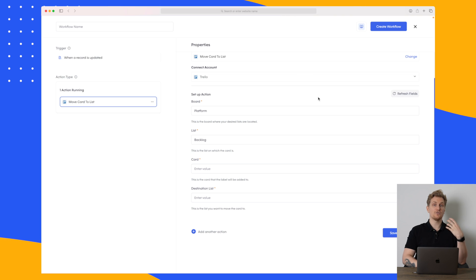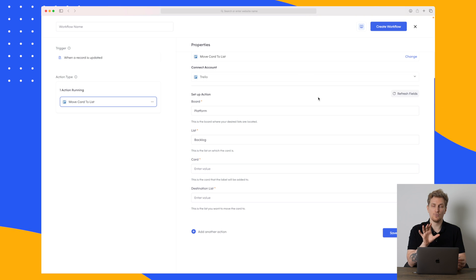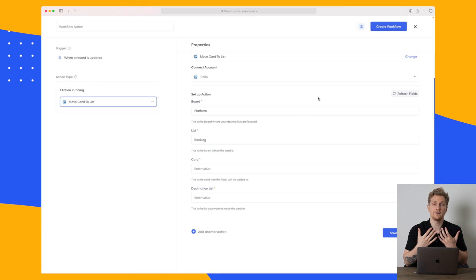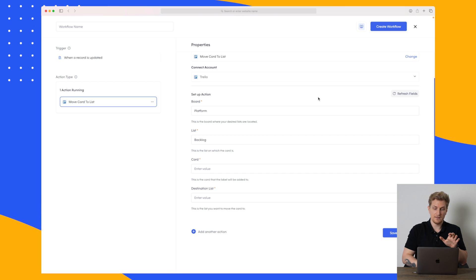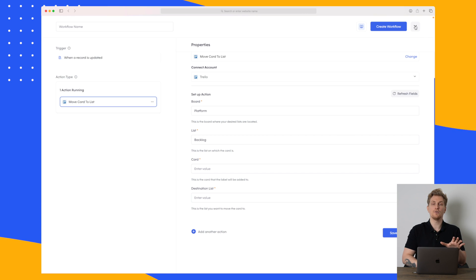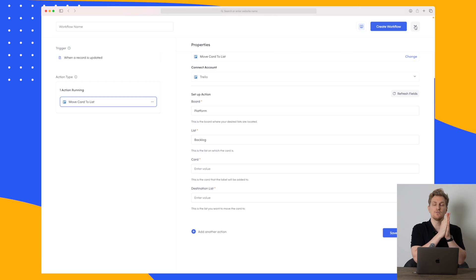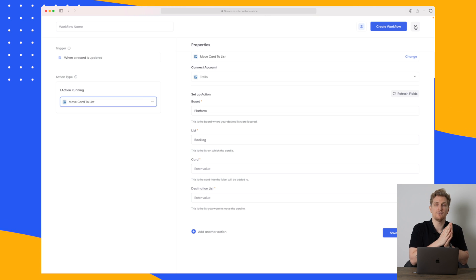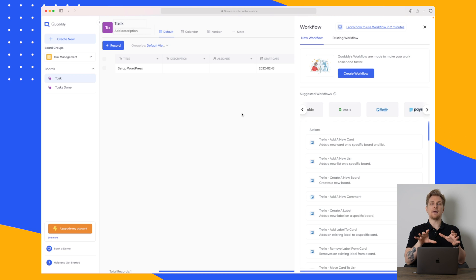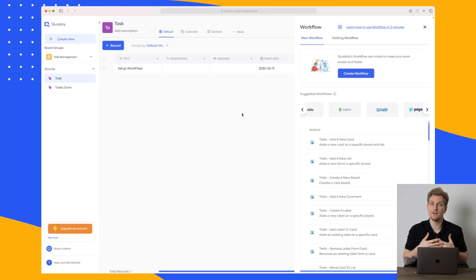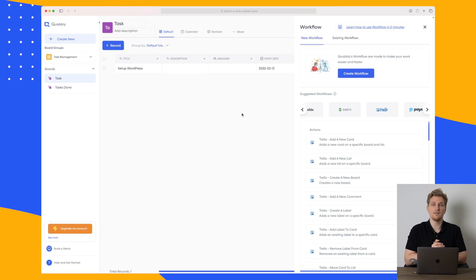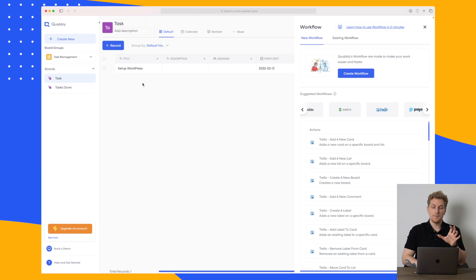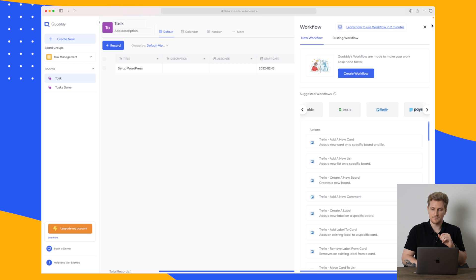You can of course also send out emails. Let's say that you're working again on a client project and every time a feature is done the client wants to know that the feature is done so they can test it themselves. Then you can go in here build a workflow and say every time a task is moved to done then send out an email to this client telling that this specific feature is done. And this is what Quobbly is all about. And now I've just talked about examples within project management but it can also be within restaurants or within orders if you take from a webshop.